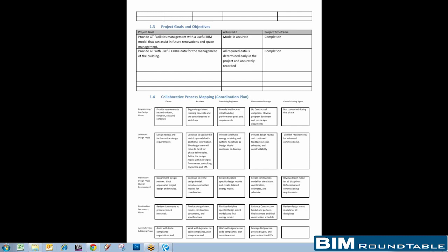And I guess our goal is to minimize all of that, because essentially I want to include those hangers, whatever is above that plenum, it needs to be shown in the model. Right, and if you have early involvement from everybody, all the players, that's why you have clash detection and coordination meetings, so you sidestep a lot of this.